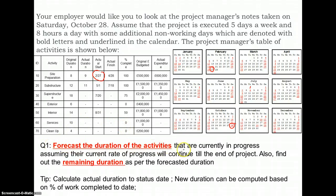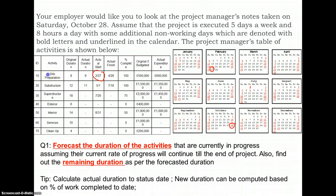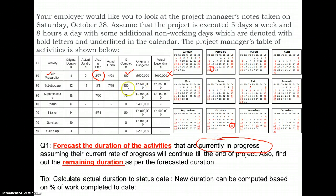The first question being asked is: forecast the duration of the activities that are currently in progress, assuming their current rate of progress will continue till the end of the project. Given a uniform rate of progress, we are asked to estimate how long the activities in progress would take to finish and find the remaining duration. We first need to see which activities are currently in progress. The first activity, site preparation, started on 27th of February and has already been completed 100%, so it is of no interest. The substructure activity is also already finished on 18th of July, so again it is of no interest.